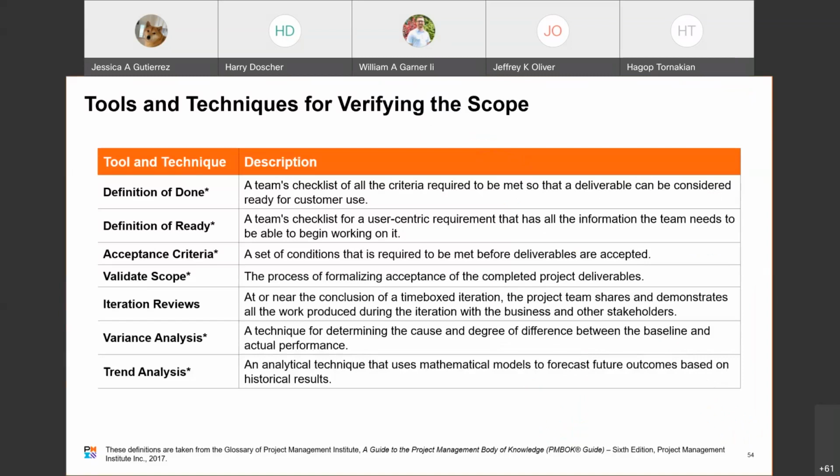Okay. So if you've got a team that interfaces with the end customer and interfaces with the development team, you need a definition of done for the overall effort, and you need a definition of done also for when the development team will be able to take a handoff from the team that interfaces with the customer.